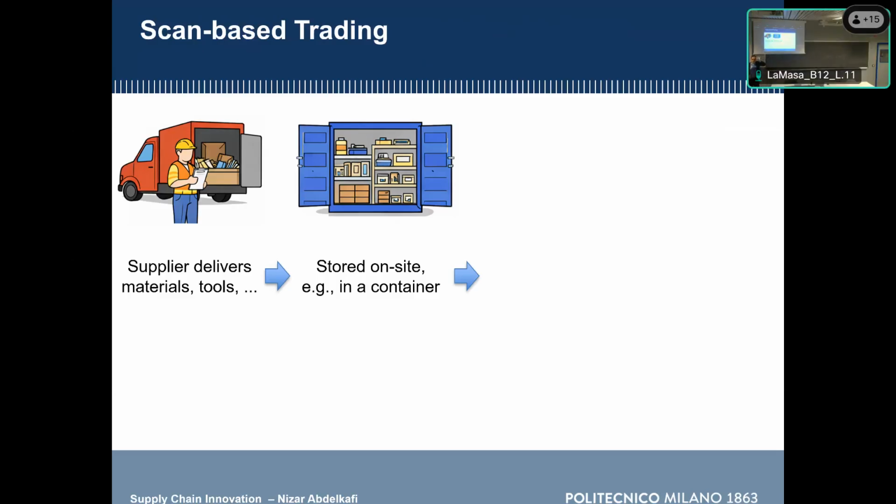Think about the process that we had in Build It. The site engineer has to make a request in order for a certain equipment to be found and then rented. What about now not bothering at all? For all equipment that we may use frequently, we have a supplier that makes a container available with all of the required equipment.